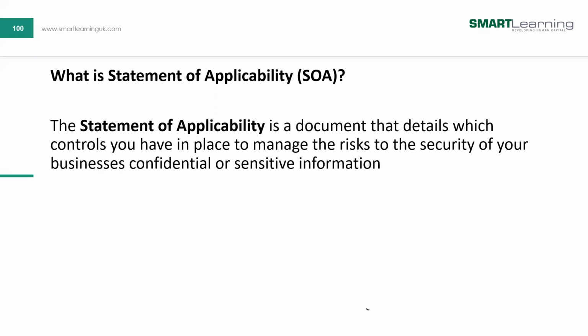Your risk register can now become your risk treatment plan because you can extend it by adding columns with dates, with people responsible. Just extend it, okay? And then that becomes your risk treatment plan, okay? The SOA can also be extended in the same manner because people want to conserve resources, or you can make it a separate document, but the SOA comes before your risk treatment plan.